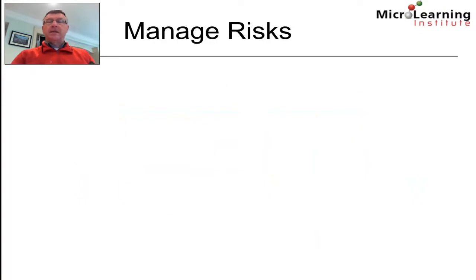Next up, we need to decide how are we going to manage each risk. And again, there's a mnemonic here, it's TARA, so it helps us to think, are we going to transfer each risk or a particular risk? Transfer could mean that we might insure the risk so that if the risk does materialize, we can transfer the cost of that risk to an outside insurer. Or perhaps we might outsource a particular task to make sure that somebody who has the right skills is delivering the task, and consequently the risk is going to be reduced.